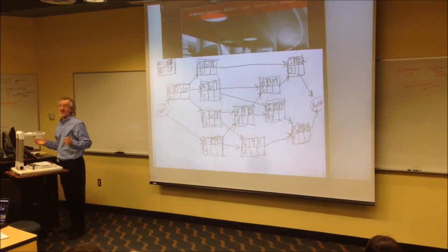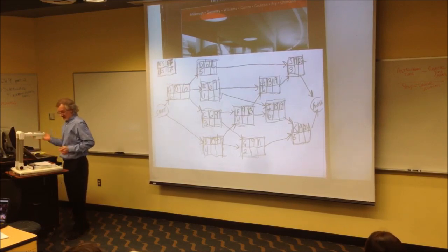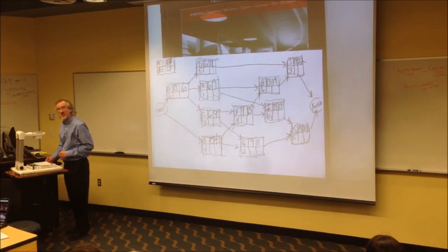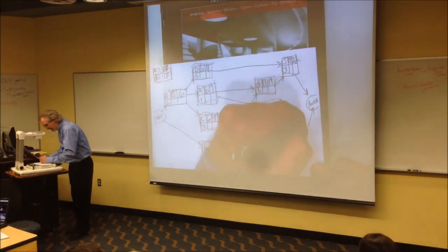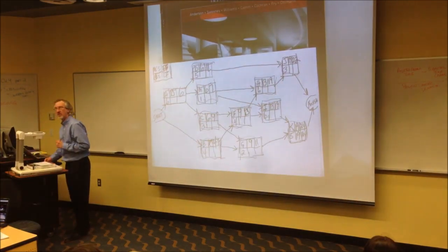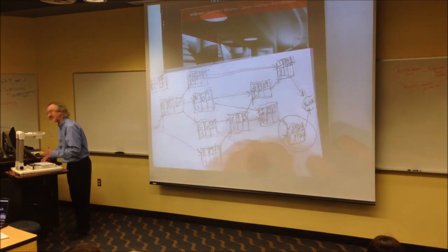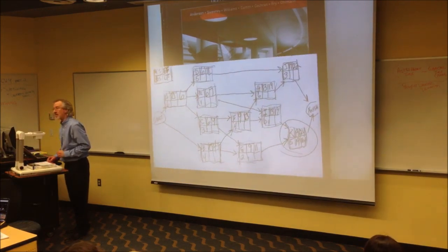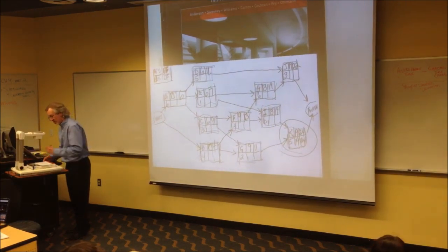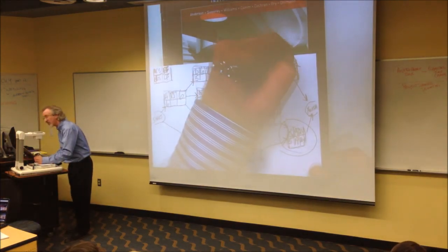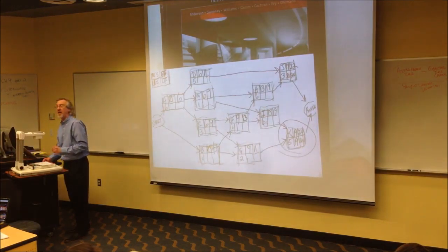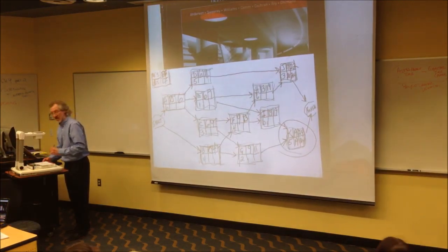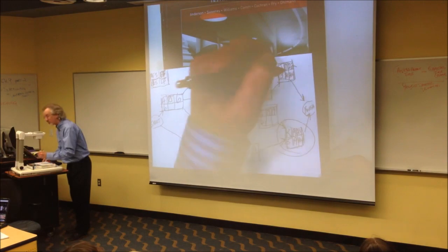Okay, backwards pass. Let's go with where we left off. K. H, I, J, K. K then, the bottom right's going to be what? The latest finish. The whole project time. Minus 5 is 19. We just discovered what? Critical activity. Go to J, bottom right-hand corner, latest finish. The whole project time, because it's coming out of the finish. Minus 3, 21. Is this a critical path? No. So it must have slack. Slack of how much? 3 or 2? 2.